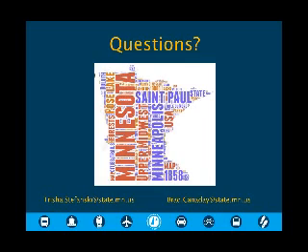That was kind of a conglomerate, like we talked about, of imagery and LiDAR, but only 3 segments of LiDAR. So getting the imagery is less expensive, I would say, but then we also did in-house extraction, and I was doing some math. It cost us $20,000 to do the extraction with students and one other staff.